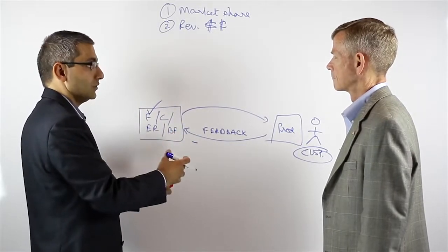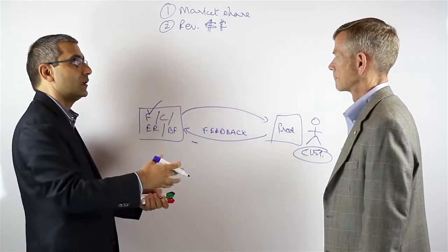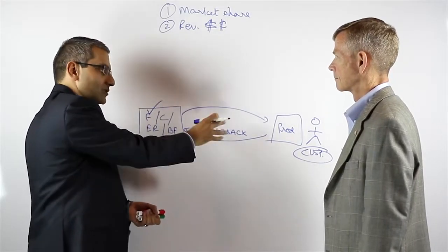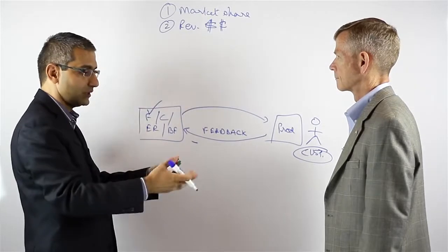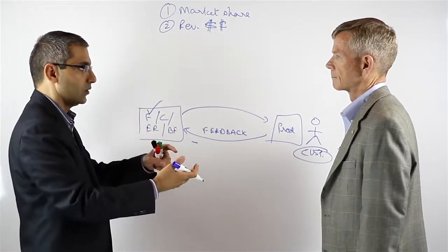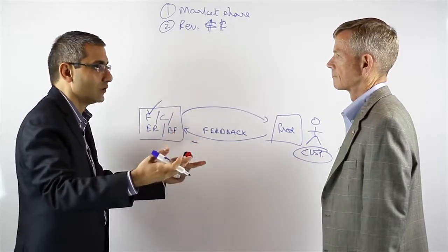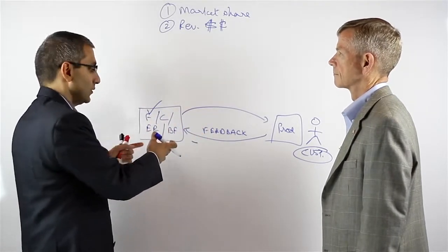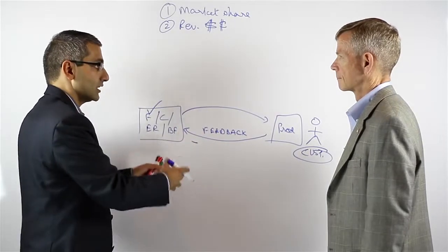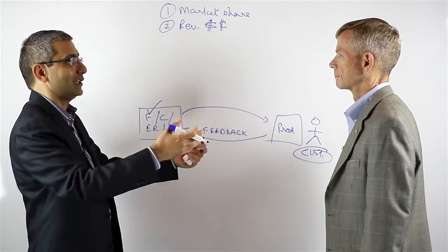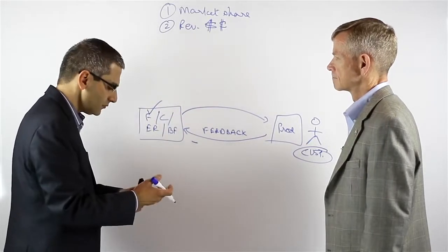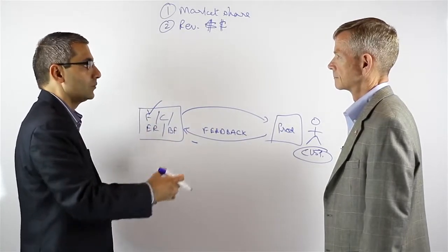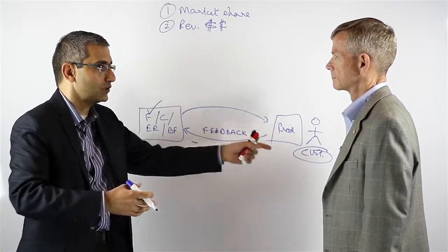And the third thing which we focus on, which is where the focus of today's presentation will be, is how do you improve the process of delivering the software itself? If there are bottlenecks or inefficiencies in that process, how do you eliminate that? The three kinds of inefficiencies or bottlenecks we typically see are waste, right, where people are wasting time or work. Unnecessary overhead, where they're spending too much time doing supporting work, not doing core work, which is writing code and testing the product. Supporting work would be something like updating documentation or writing status reports. And the third is overproduction, where teams do not collaborate well and they have to do a lot of rework or produce features which don't make it to the final product because they were not planned properly.